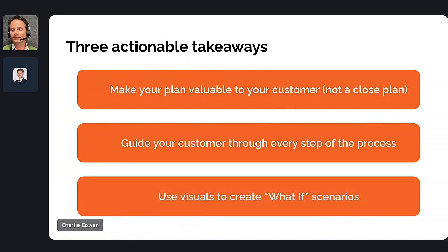And the third actionable takeaway is about using visuals to create what if scenarios. What if the lawyer is away for a week? What if it takes 2 weeks longer for them to feed back on your proposal? What if your pricing has to change and that changes the timeline?